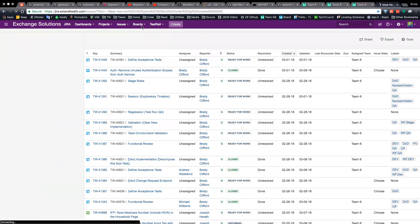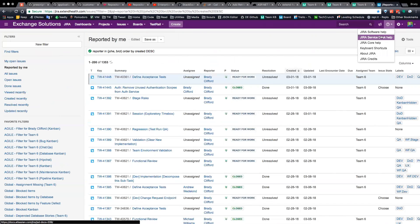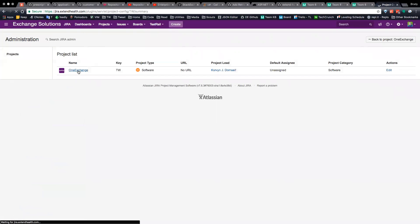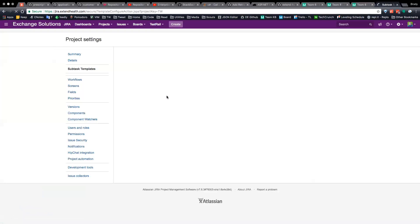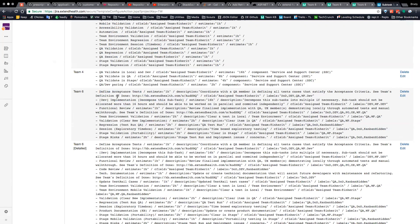Let me show you where the template is. You go to Projects, then here, then Subtask Templates. Team Six — here is ours, the summarized one. The first subtask it creates is 'define acceptance tests,' then 'implementation: decompose the subtask,' meaning you should either rename this dev subtask or make it into multiple ones. Then you have your functional review and all the QA subtasks. I'd like to see us right after planning make sure that all the tickets we commit to have these default subtasks, but the implementation one won't yet be decomposed — it remains like this until you have that first powwow with your QA, and it's at that moment that you decompose those subtasks.